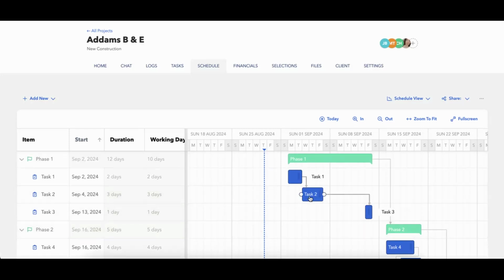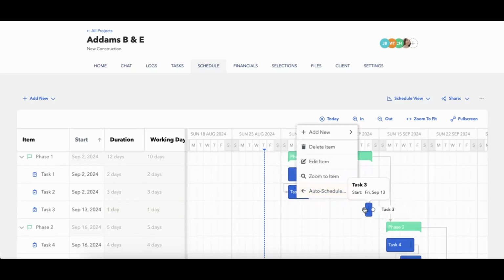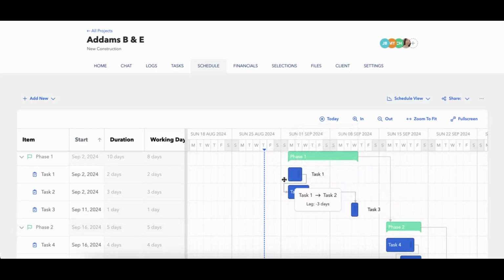But again, all you have to do is if you use that option, you just got to drag your task back. And then if you had a task that had lag time out here, you can just use that all successors again on this particular task to move everything back the way you want it to. That's one of the caveats about auto schedule that some people don't like is that it doesn't necessarily maintain that negative lag. It always maintains the positive lag, but because the negative lag is technically an override here, it's not going to maintain it for you.